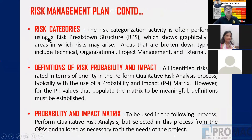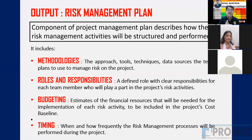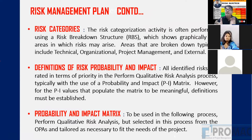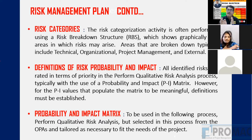We must have planning for risks. The risk management plan defines how much cost we can keep for risk. We must define categories — risk can be technical risk, project management risk, organizational risk, environmental risk, external risk, internal risk, estimate risk, quality risk — there are endless categories of risk. So we must have a long list of risk categories and create a risk breakdown structure containing all these categories. This is done in the risk management plan.